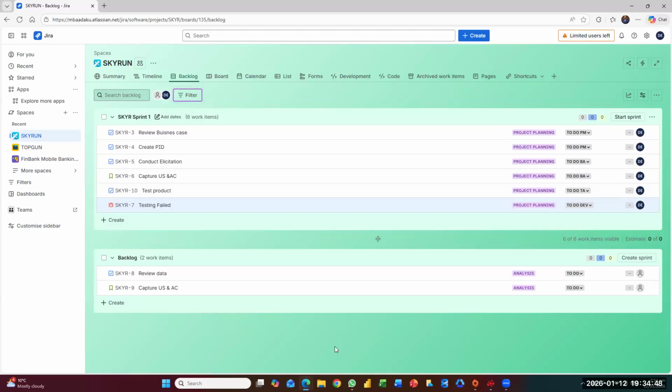Because when you're having your stand-up sessions, you're having discussions based on those tickets. Who has done what? You're reviewing. Okay, are we changing the status of this from to do to in progress or to done? These are the things you'll be reviewing for that sprint. So it gives you clarity on what work needs to be done, what has been done for that sprint, what you need to focus on. And then everything else that you're not ready to action or you've actioned, more like noise at the time, will be below here, just waiting for you to bring it up.